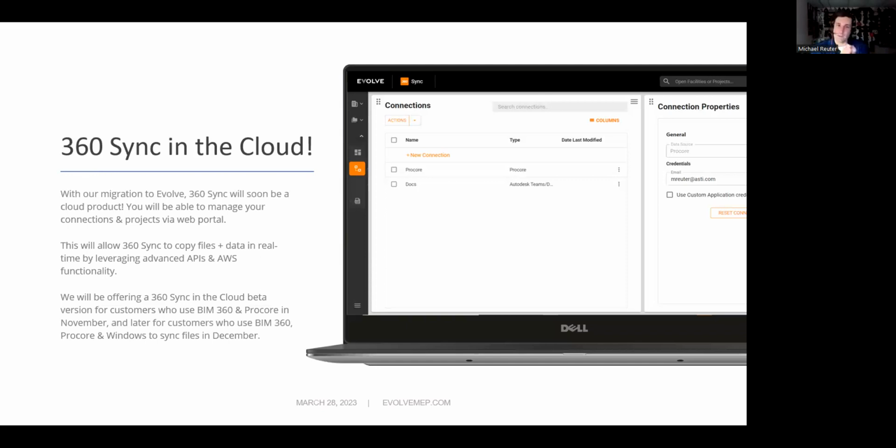So if we go back to the example that I laid out before, the subcontractor writes the RFI and they assign it to the general contractor. So they mark it as open. Once they mark the RFI as open, that gets sent to the general contractor in real time. And so then the general contractor gets an email from their document management system saying that a new RFI has been created for review. They go, they review it.